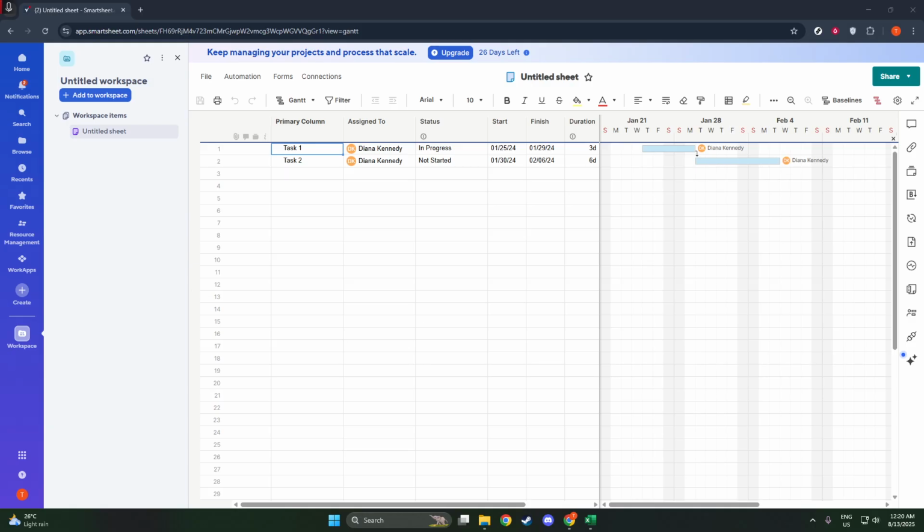It's important to define the length of your working days accurately, since this affects how Smartsheet calculates task durations and project end dates. Generally, the standard might be 8 hours. But you can adjust it according to the specific needs of your team or project.